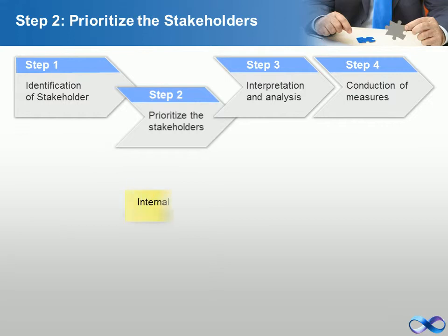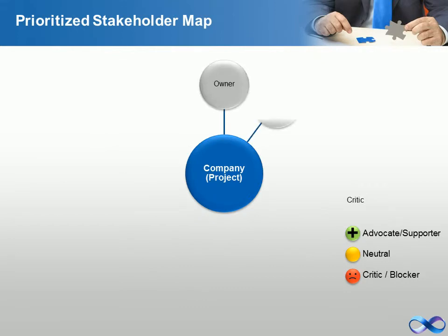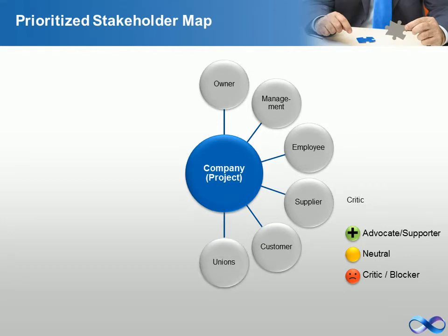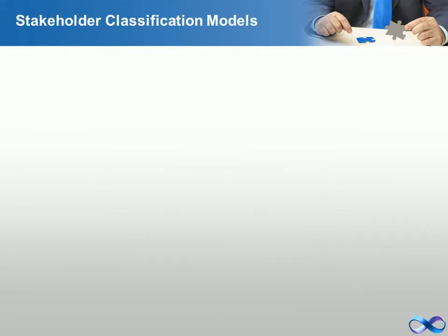The power grids. Power grids group the stakeholders based on their level of authority, power, and their level of concern, interest, regarding the project outcomes. Someone's position on the grid shows you the actions you have to take with them. Low power, less interested people: least important area. Monitor these people, but do not bore them with excessive communication.